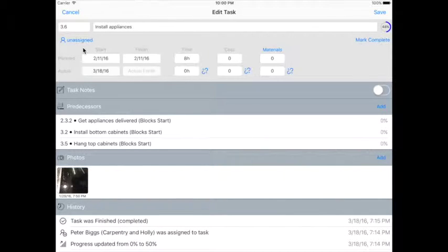The next fields will show you the dates. We currently support two sets of dates, planned and actual start date, and planned and actual finish dates. The user can modify planned dates, and the system will automatically populate the actual start when the task is started and the actual finish when the task reaches 100% completion level.